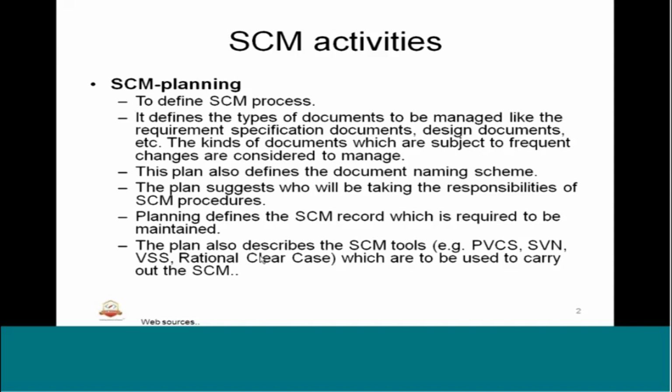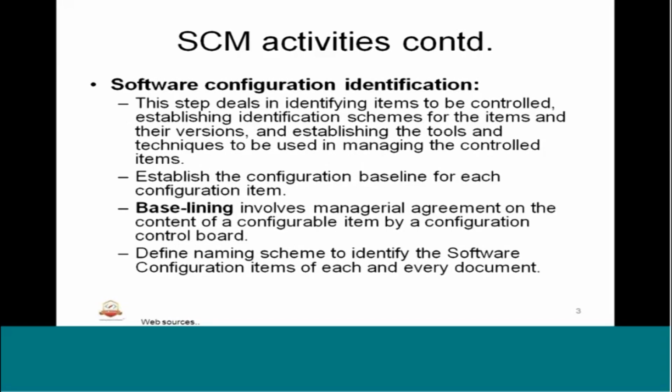Okay. Continuation of the SCM activities. Software configuration identification. This step deals in identifying the items to be controlled, establishing identification schemes for the items and their versions, and establishing the tools and techniques to be used in managing the controlled items. Establish the configuration baseline for each configuration item.